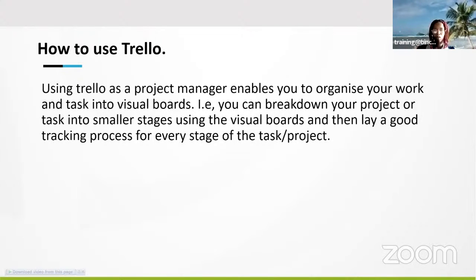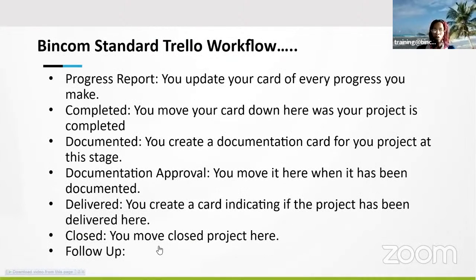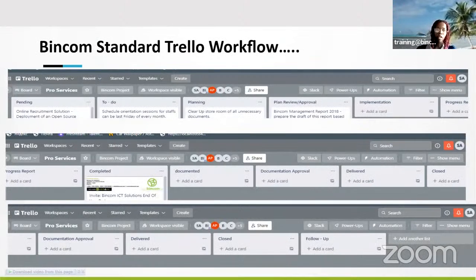So how you use Trello is to really organize whatever thing you need to organize. I would say it is a tool for organizing from day-to-day activity to project-based and product-based activity. So if you're a product or project manager in Bincom, a standard workflow is supposed to have pending, to do, planning, plan review and approval, implementation, progress reports, completed, documented, documentation, delivered, close, follow up. This is how it actually needs to look like.